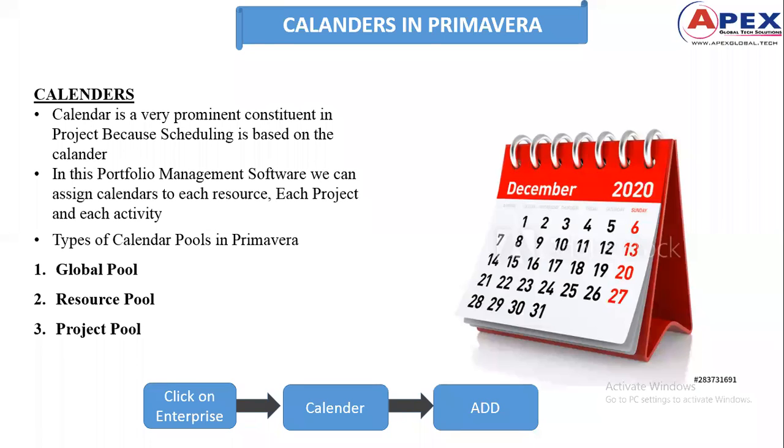Consider that we have Sundays in the calendar, government holidays, and some exemptions. In some construction industries, they observe Vishwakarma Puja as a whole day holiday for employees and workers. Those must be incorporated in calendars.